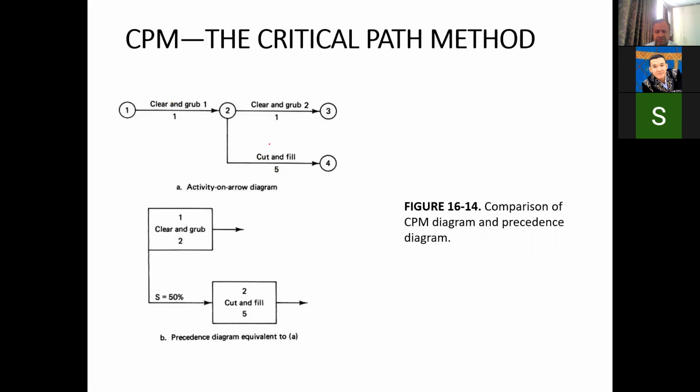So in that case, if the cut and fill activity can be started just when the clear and grub activity has been finished almost 50%. So if clear and grub takes 2 weeks, and 1 week has passed, maybe we can start the cut and fill activity as well.